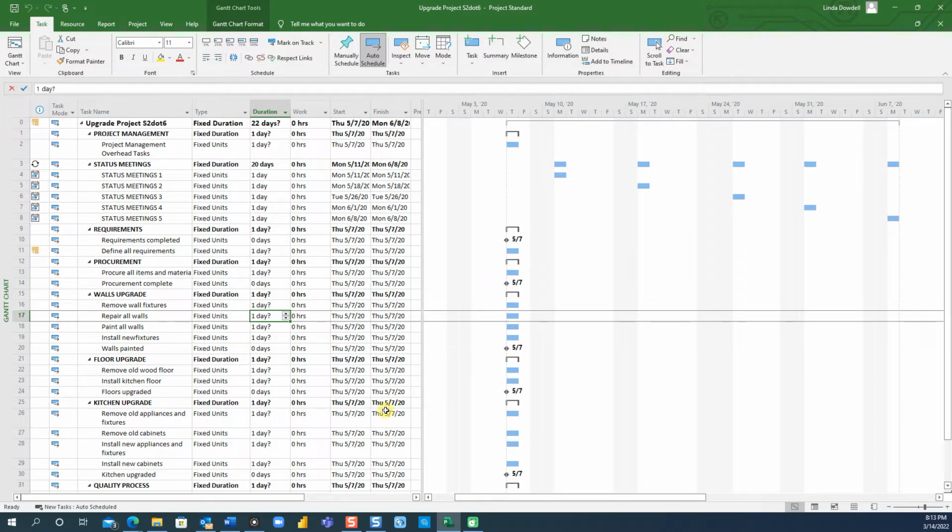Another thing to remember going forward is that the first thing you or your team know is the duration of tasks. Say, for example, your team members tell you a particular task is going to take 5 days, averaging it. If that is the first thing you know about tasks, then you should enter the number of days in the duration field.